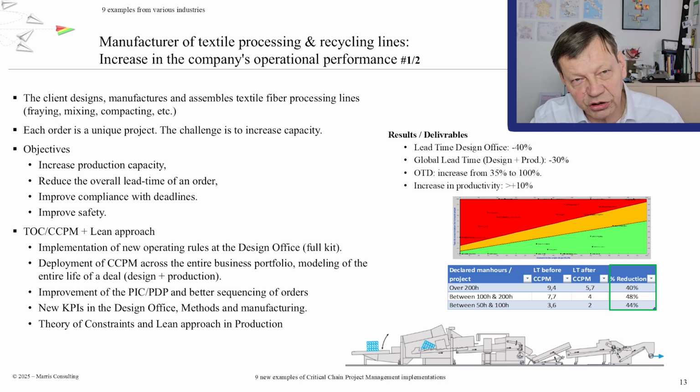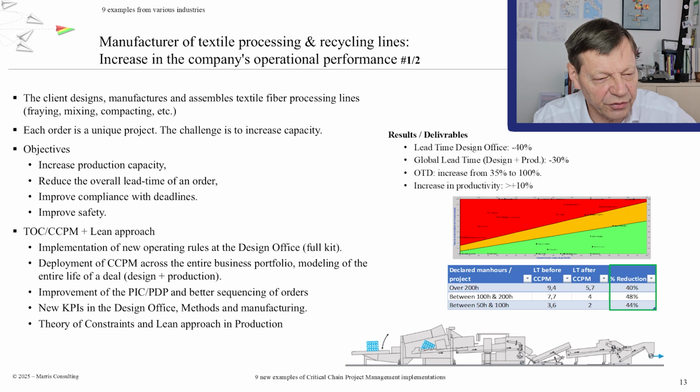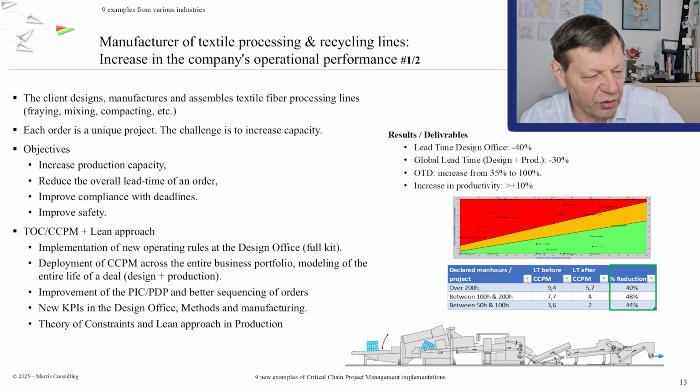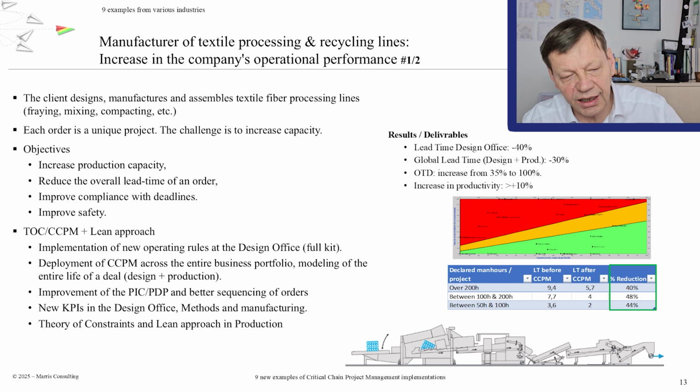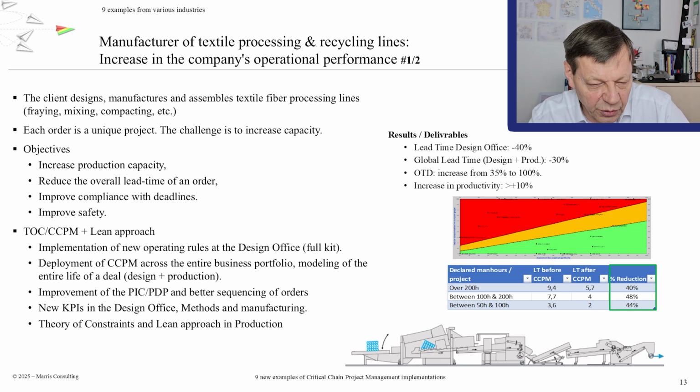So the critical chain approach was deployed across the entire portfolio and throughout the process, from the initial discussions with the clients, including a call for tenders, so a little project that would run a couple of months maybe to reply to a call for tender. Then it would be designed in the design office, and then it would go through production. Well, there'll be purchasing of all the different components and production, and the whole thing end to end was put into a critical chain plan and executed as such.